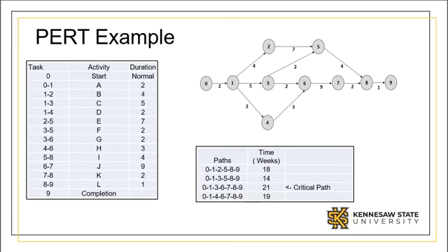Events not on the critical path can be delayed by the slack time and not affect the critical path. Suppose we wanted to find the slack time for event 5. Note that event 5 has 2 arrows coming in. Both must be complete before we can start event 5.